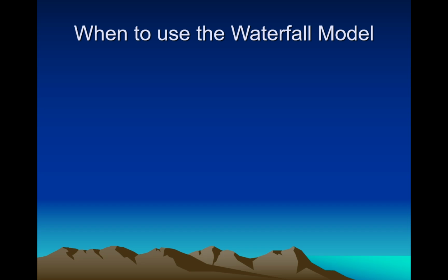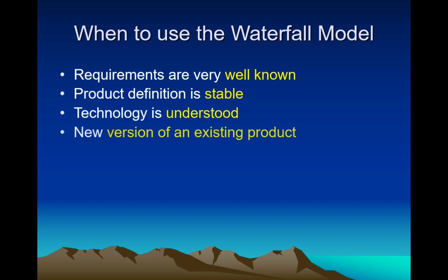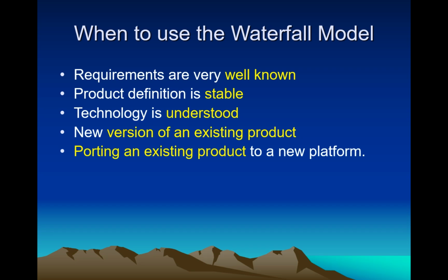Let us proceed to when to use waterfall model in software development. First, requirements are very well known. Second, product definition is stable. Third, technology is understood. Fourth, new version of an existing product. Fifth, porting an existing product to a new platform.